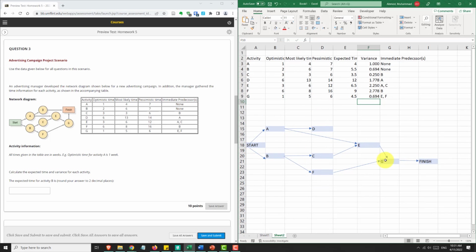That's the reason we draw start and end nodes, that all paths must start from start and end at finish. You can't just go A, D, and then just stop. You have to go on all the way to finish, or go to some other node which goes on all the way to finish. So we can't leave nodes without anything coming out of them, just to complete our paths. I mean, you could, and you would just know, okay, after AD, then this path is finished. Like logically, you would know that.